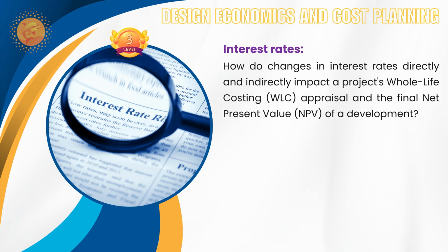A higher discount rate significantly reduces the net present value. So it will not be helpful because your net present value will be lower when you apply a higher discount rate. And it makes projects with high upfront capital cost less attractive because the value gets reduced at a higher rate.